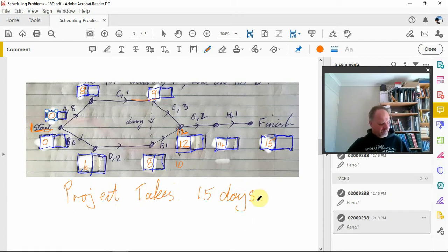All right. Now, in some of these things, there's going to be float times, all right? So, like around here, for example, it only takes 10 days, whereas around this way it takes 12. So there's a 2.